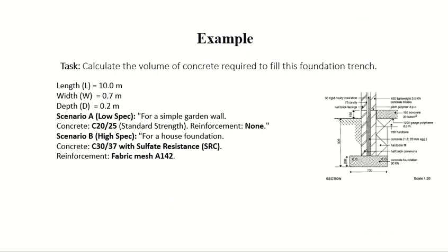And we have looked at this example where we have looked at the concept. So this is basically emphasizing the importance of specifications, okay? So when you change the specification, complete pricing will change, your BOQ will completely change, okay?